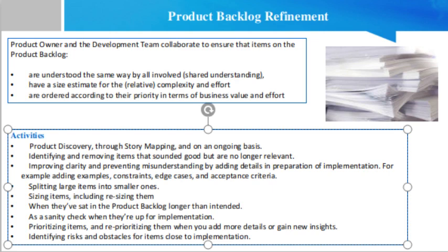Now, why is backlog refinement important? First of all, without shared understanding, you risk implementing the wrong thing, wasting effort and having to rework the implementation to get it right. Without sizing each item, you are not taking the cost of items into account and risk overrating high value, high cost items and underrating low value, low cost items. Without ordering your product backlog in descending order of prioritization, you risk working on items that are not all that important and missing important ones.